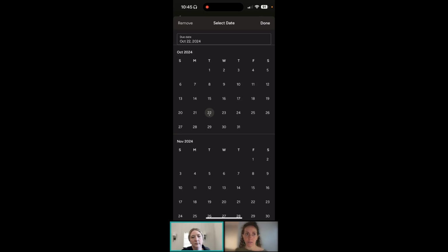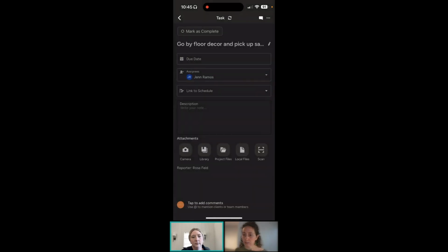Let's say this is due by next Wednesday. We are going to choose that. You can link it to an item on the schedule if you'd like. You can add in a description if you want to say exactly what samples to pick up. You can add images, things from your library, etc. And then you're good to go. And when Jen completes that task, she'll be able to mark it as complete and you'll be notified.